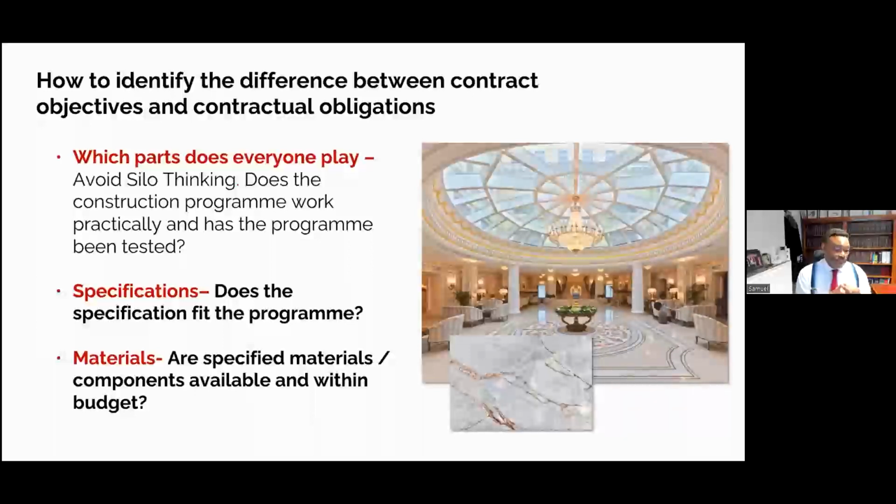And in this case, a couple of examples come to mind. I was part once of a substantial shopping center construction project where the intensity of the program required a substantial amount of in situ concrete work in terms of the frame, the floors, to proceed at a rapid pace. Now, it transpired in that case that the M&E drawings, including the air conditioning drawings, were running later.